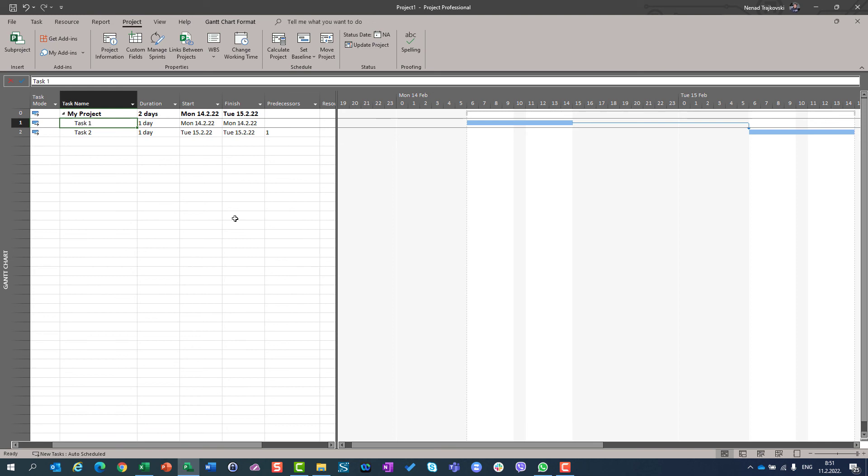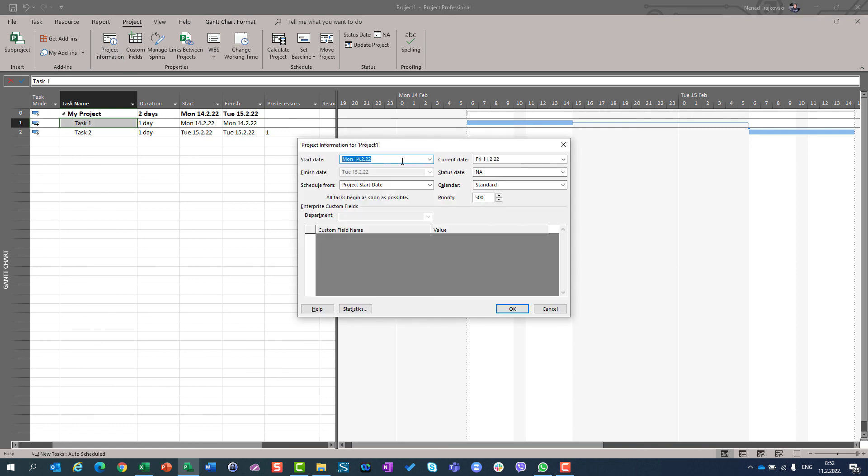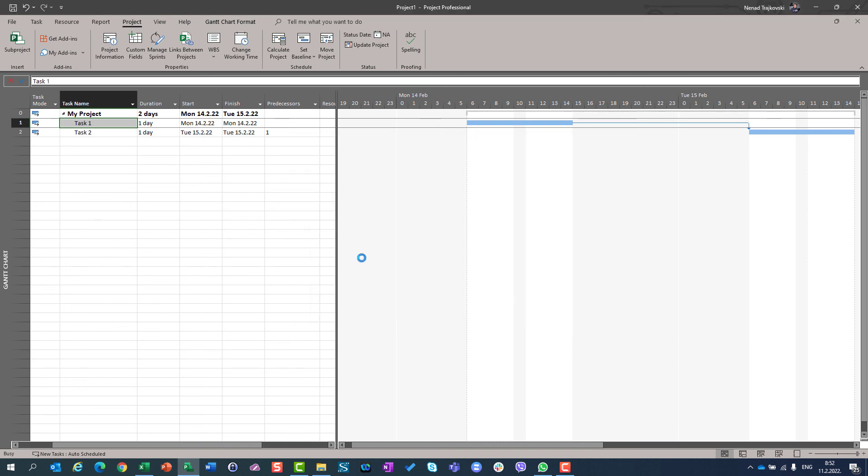So, remember, if you want to start at specific date, at specific time, which is before 8am, you should manually enter the start time right behind the start date. So, let's say here, 6-0-0 and you will get the right result.